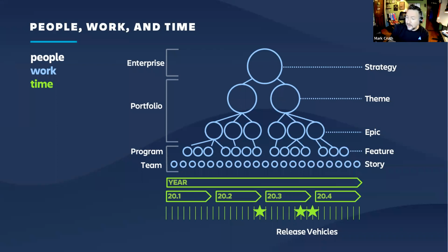We have annual cycles, and that's where our strategy lives, and we call that a strategic snapshot. And so for us, we can start seeing how organizations have strategic snapshots, programs have PIs or quarters, teams have sprints, and it's building within these small feedback loops that get bigger and bigger that allow us to help, again, move towards that strategy and pivot as we go. So that just gives you an idea of, essentially for us in Jira Align, we're taking these constructs, and again, we're being very intentional and we're putting them in.